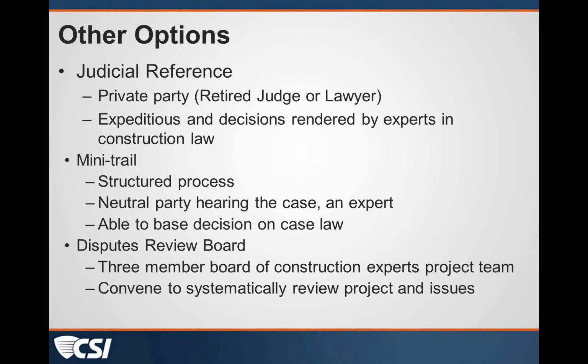and you can have them systematically throughout the life of the project review the project status, issues that come up, so that they're more involved day to day. Well, not necessarily day to day, but they're more involved in the happenings of that project over the life of that project, as opposed to just being called in to hear the single dispute.